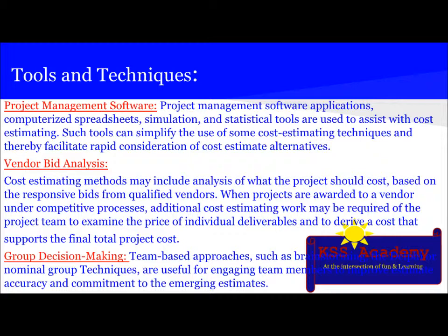Then there is the group decision-making technique, which uses team-based approaches such as brainstorming, the Delphi method, and nominal group technique, which are useful in engaging the team members to improve the estimate accuracy and commitment to the emerging estimates.